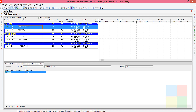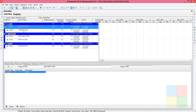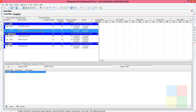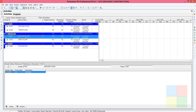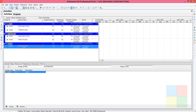The activities are now grouped based on their cost. As assigned: Second and Third Floor are Low Cost, Ground Floor and First Floor are Medium Cost, and Foundation is High Cost. In the same way, you can use any other activity codes by creating them yourself or using the default ones.